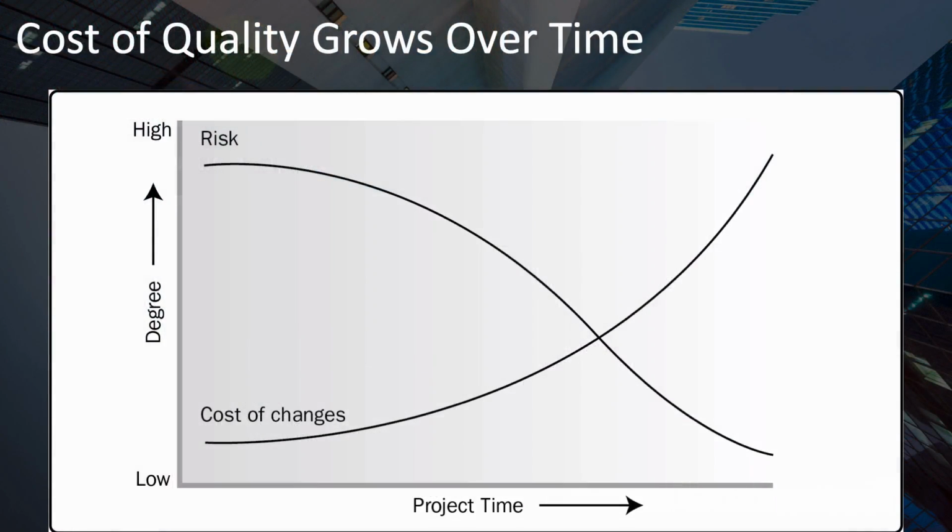Projects will start with the costs of prevention, which are relatively low. During the project, appraisal costs will also start to be incurred. If you can avoid most of the costs of non-conformance, that is, internal failure costs of rework and scrap, then you can avoid an increase in the cost of quality toward the end of your project, as well as even higher costs of external failure costs after the project.